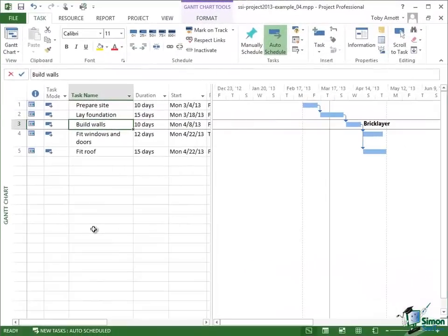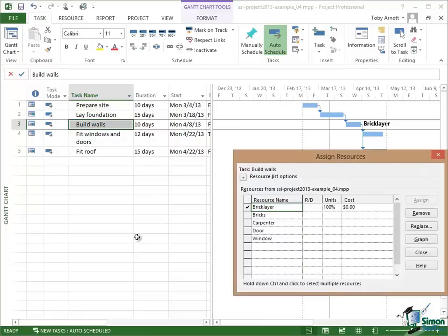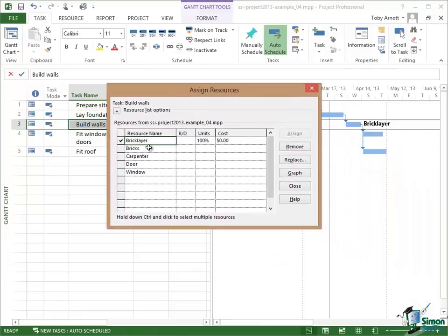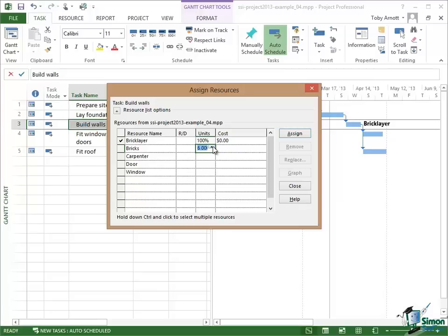So let's now use some bricks. Let's again right click on Build Walls, click on Assign Resources, and this time I'm going to assign bricks, but I'm not going to assign one unit of bricks which of course would be 1,000 bricks. I'm going to assign 12 units because I'm going to need 12,000 bricks for this house. Now if I use the little rollers here, I can go up in multiples. I'm going to say I want 12.